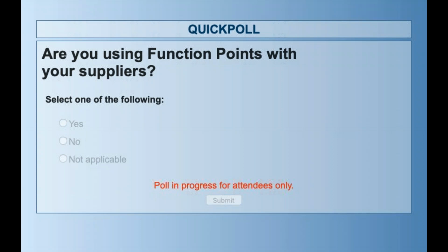Now, bearing in mind, AFP is based on IFPUG. It's mapped back to the original function point standards. So you can go to a benchmarking organization and you can compare AFP to that benchmarking organization's data, even if that data has been collected in a more traditional way. So you've still got that ability to tap into what is the world's biggest collection of benchmarking data, which is all based on function points, going back to 82, 83 was the first major benchmark.